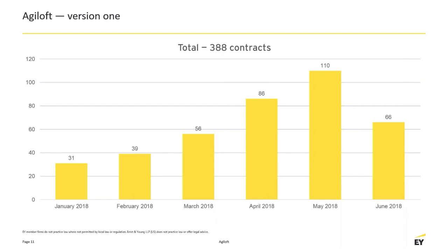And remember, I have Agiloft, so I know I have an agile solution. I have something I can go and change, unwind some of what I've done, make some changes. So we had some brainstorming sessions, got some surveys and user experience feedback, and we put our heads together and redesigned the user interface, the user experience, and what the process flows and workflows were going to be. We presented it to our leadership and key stakeholders and said, this is what we want to do. We want to shut down the application in the middle of June and do a redesign, and we will go live on September 5th, and we will meet our timeline.